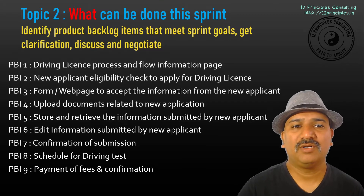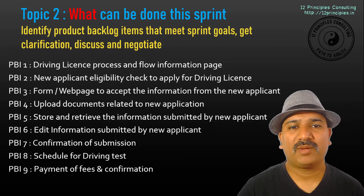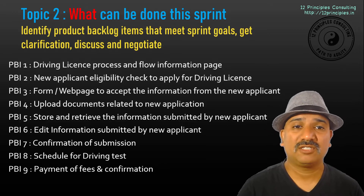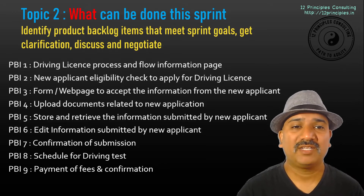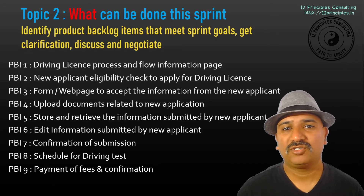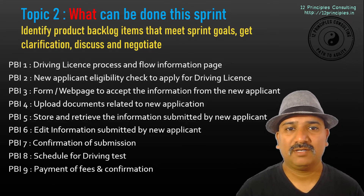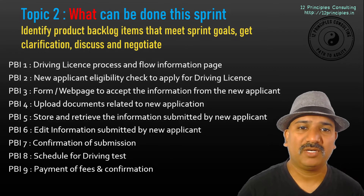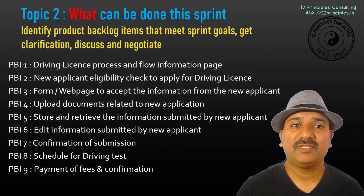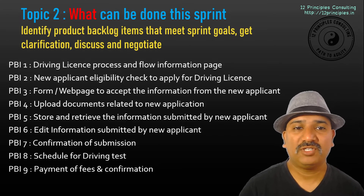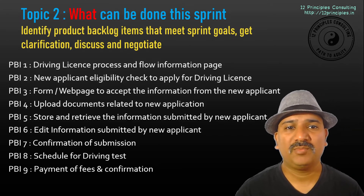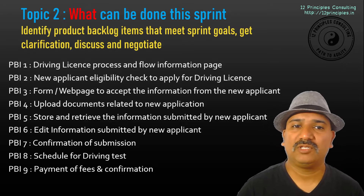Now that the team members have picked up the nine Product Backlog items which they potentially think will meet the Sprint Goal, this is just a forecasted list. The team members could potentially plan for nine and eventually finish with six or seven, which they inspect by end of the Sprint. They might also pick up the 10th, 11th, and 12th Product Backlog items if they finish earlier. There are no restrictions on team members picking up new items during the Sprint.